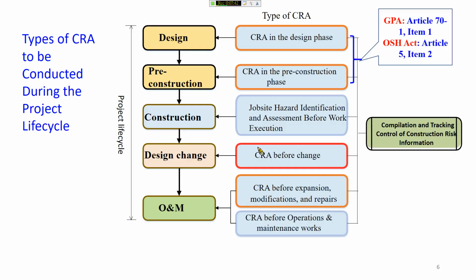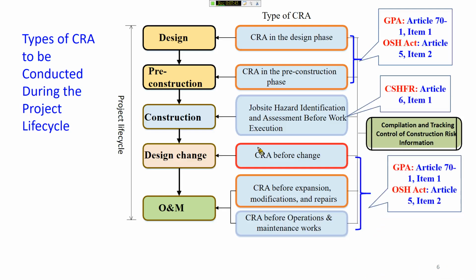And in Taiwan, for every phase in the construction project, according to the TOSHA CRA, they have different guidelines to perform the CRA in different phases. Like in the design phase, they have the design phase CRA for the designer, okay? And for the construction contractor, they have the guideline for pre-construction phase CRA for the contractors.